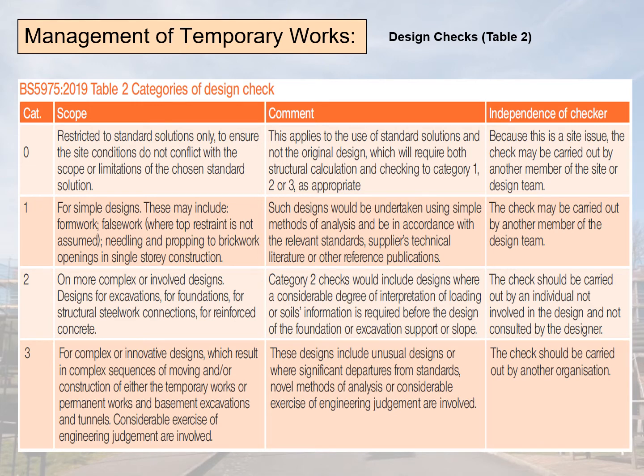More complex projects will fall under Level 2. Foundations, the design of open excavations, overhead galleries and more detailed scaffolding systems will fall into this category. They need to be checked by an individual outside the organisation which has done the original design. This will allow a total standoff check to be conducted.